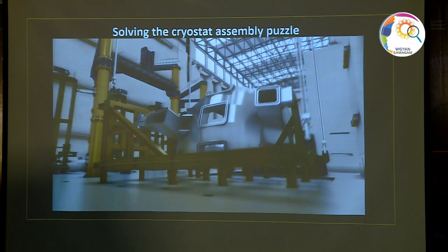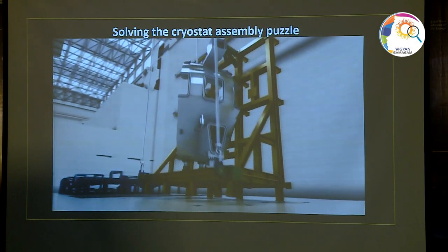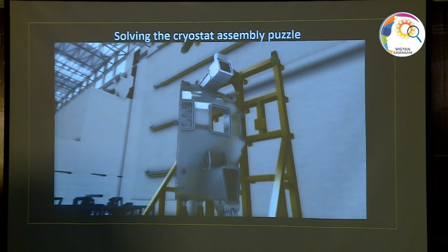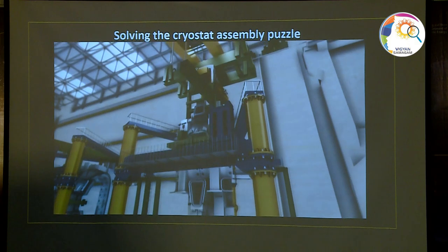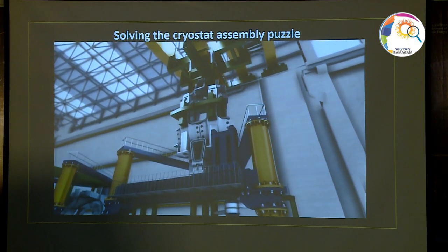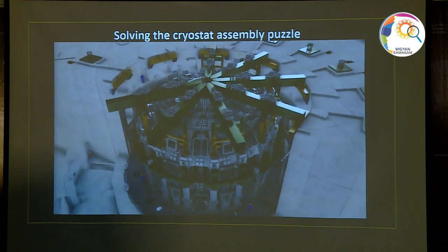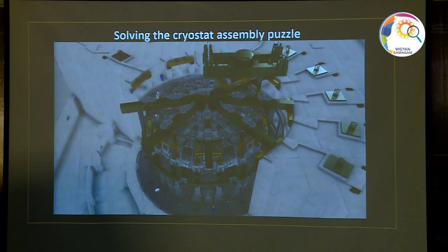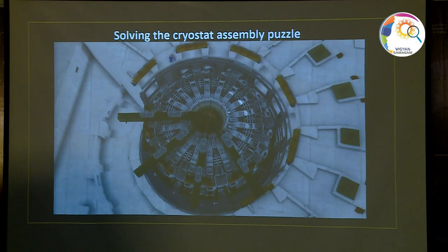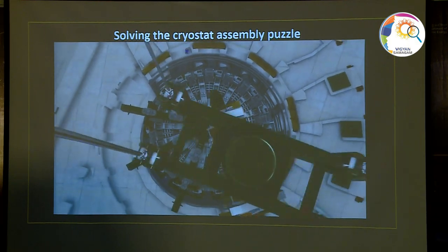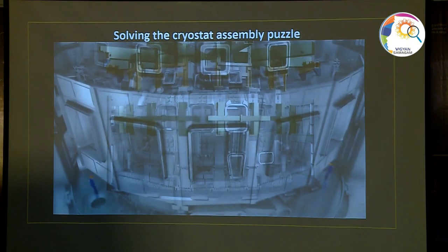The tools will have loading capacities that vary from 500 tons for the upending tool that will turn vacuum vessel components from horizontal to vertical, to 1,500 tons for the heavy lifting tools used to lift the sub-assembled sectors into the tokamak pit for final assembly and welding. There, the largest purpose-built tool, the in-pit assembly tool, will grasp all 9 sectors together, 3,800 tons, in order to align the vessel structure. The complete assembly of the ITER machine will take about 4 years.